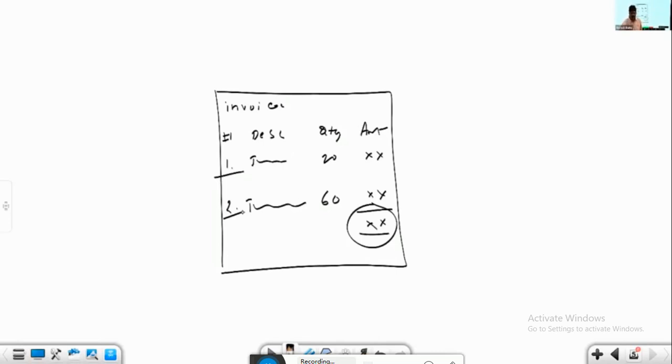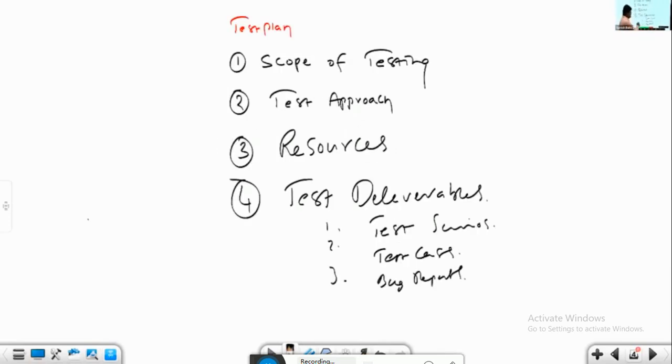So first I need to communicate to my team. These are the documents we have to make ready, because these documents I have to submit to my client along with the invoice, correct? If I mention 20 scenarios, I have to submit them to my client. Without reviewing, without verifying the work, no client will make a payment. If I simply ask, our people are working, make this 1 lakh of payment, the client will say: what is the work you did, submit. I'll cross-check, then I release the payment. So first I need to communicate to my team members.